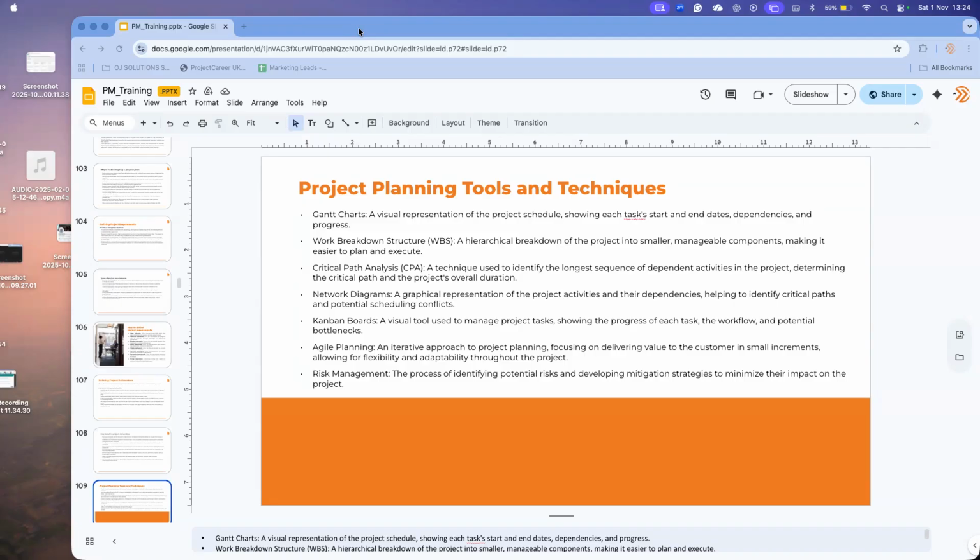Right now it's showing the critical path, which is just like the whole document, because the critical path is the longest string of dependencies. Since everything is dependent on the previous thing, the whole thing is just a critical path. So with this kind of project, we literally have no wiggle room. Everything has to be back to back to back. There are no gaps. If one thing goes offline, that sets everything else off.